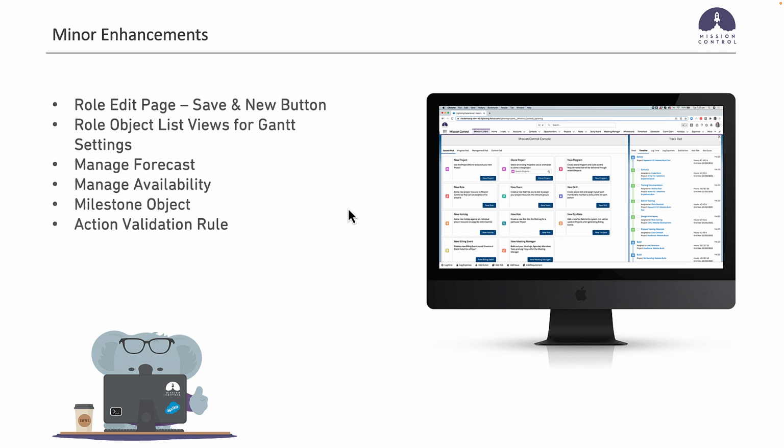There's one field being added to the milestone object and one formula field being modified. So we have included a field called expenses invoiced, which calculates the sum of the expenses relating to that milestone. And then that is used to accurately reflect the amount remaining. So particularly when you're using the billing generator and the milestone is fixed price plus expenses, it's used to reflect the amount remaining accurately rather than counting expenses that have been invoiced.